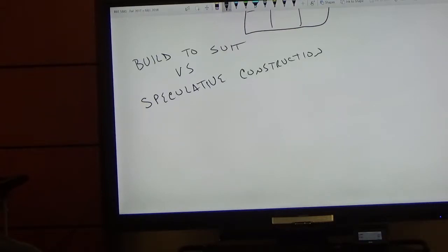Okay? Build-to-suit, let's say something happened again, the market, the person doesn't want it, so I guess the person is stuck with it? Well, normally you're going to have an arrangement that's pretty much going to say, we are building this for you, you are committing to purchase this immediately upon completion, regardless. But usually there are going to be specific damages that you would be able to pursue in the event that they back out of the deal. Okay, sort of liquidated damages or specific performance or something. And then once again, that gets into more of a real estate law kind of question.